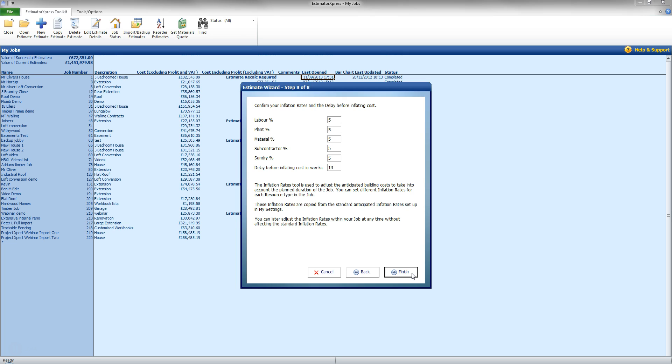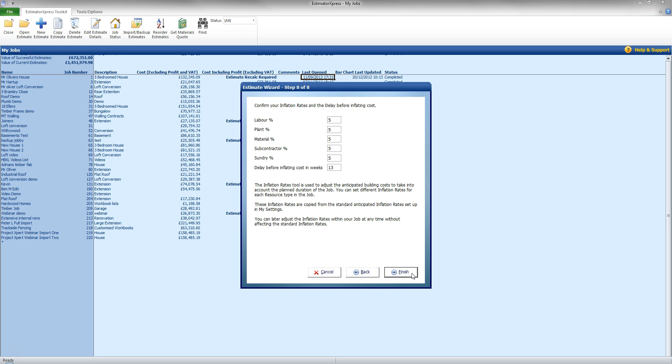And then we go to inflation rates as well. Now these are particularly useful if you are in a longer project. So after a certain time period the cost of materials are presumed to go up by a certain percentage. As well as say plant, material, subcontract and sundry. Also if you are estimating for a job further down the line or as an example you are estimating in November for a job that is to start in the new year. You know that generally new year material price increases kick in and you can account for that at this point as well. Of course you can always return to this at a later date and it gives you an option when producing the quote to include the inflation or not.